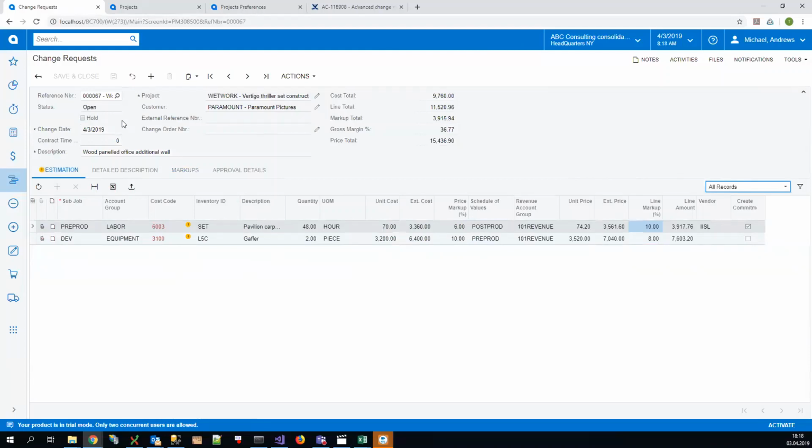Either I will approve both the cost and commitment part and the revenue part at the same time together in one change order, or I will need to approve the cost part before approving the price part, because approving the revenue part and the price part with the customer or client might take a lot of time. It might take, for instance, half a year to approve the revenue of the change order with the customer, whereas we would already need to have started the works and have created the commitments that are specified in the cost part